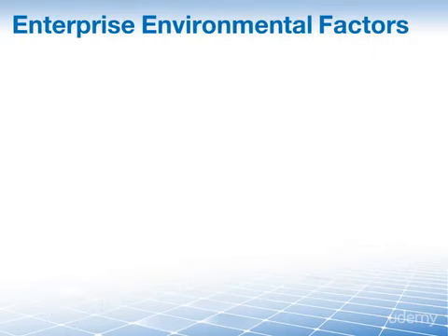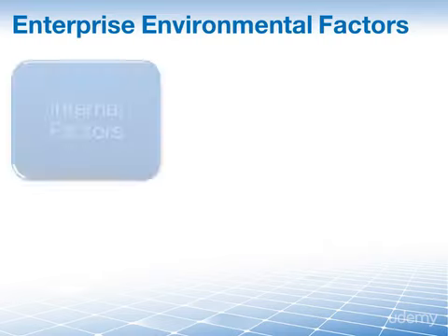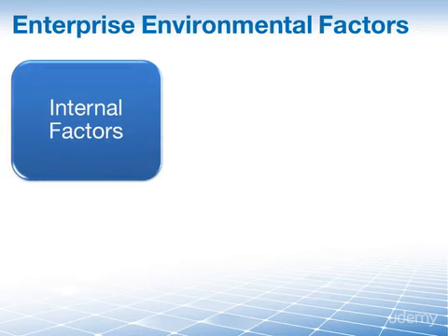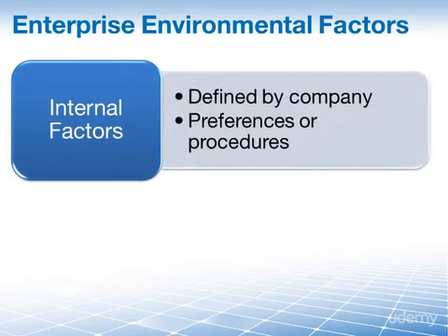The enterprise environmental factors will have a significant impact on how communications are planned. How you communicate is influenced by many EEFs. Generally speaking, they fall into two groups. The internal factors are, of course, most often defined by the company itself. Here we're talking about preferences, policies, or procedures. For example, whether you send your status report via email or you simply have to post it to your company's intranet and then people have to go and grab it from there.